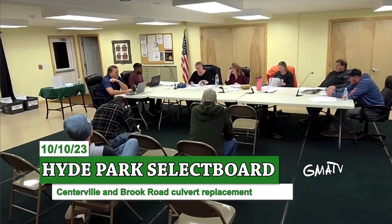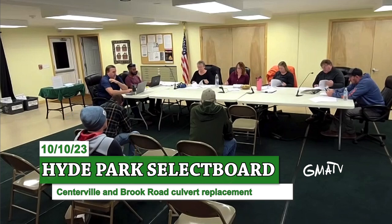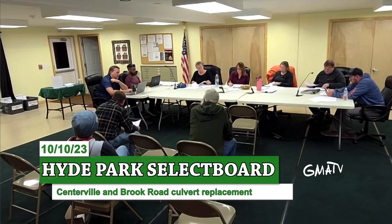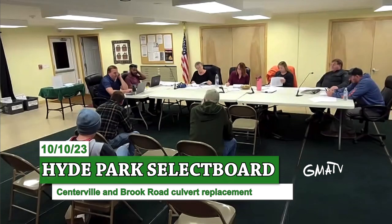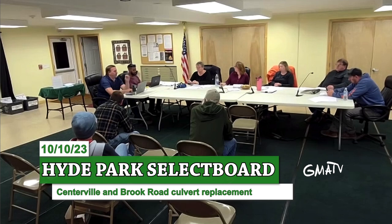Well, we have a process with change orders. When we first found out about it, Ron and the engineer did a sort of repeat of Centerville. We asked Ron to sketch out where, and this is for FEMA purposes too, because this is a change order request and we have to meet the requirements for FEMA, which will need a justification for the change order, a sketch of where the ledge was found. So that delayed it. Ron said it's going to cost X dollars and we need approval to move forward in a $7,500 add. The engineer has to review it. The contractor has to draw it up, make quantities, estimate the price. The engineer has to make sure that's a reasonable cost. All those things have to be done.